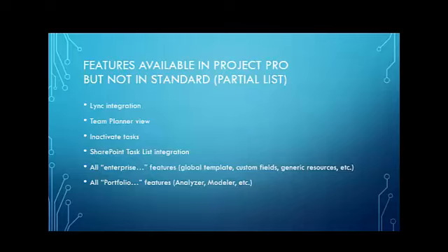Okay, the SharePoint task list integration. This is not related to Project Server-based EPM. This is sort of a lighter weight workgroup collaboration capability. And then all of the enterprise and portfolio features, like the enterprise global template, enterprise custom fields, and so on. Now, of course, Project Standard does support a global template and custom fields, but not in the enterprise context. So they're not designed to be centralized with your Project Server and standardized across your organization.